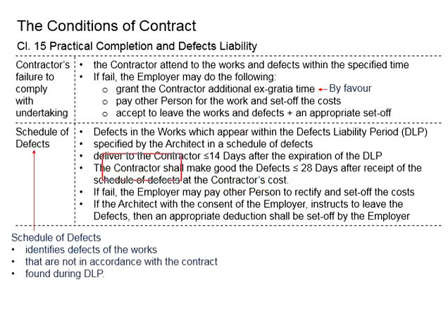Now, if the contractor fails to rectify those defects or chooses not to rectify them, the employer can employ another person to do the rectification work. The relevant cost will be offset from the payment. That means the cost will still be imposed onto the contractor.